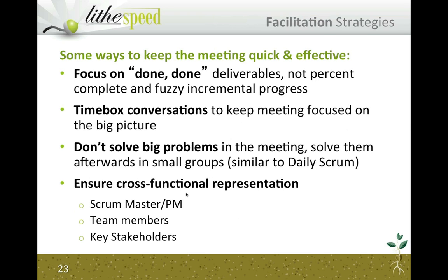Some of the key things to remember here are that this is a roll-up. The idea here is to really have on the board not every user story and every team that you have. These are roll-ups of features and epics, if you will, and things that are not typically managed in a product backlog, like these non-code milestones and so on.